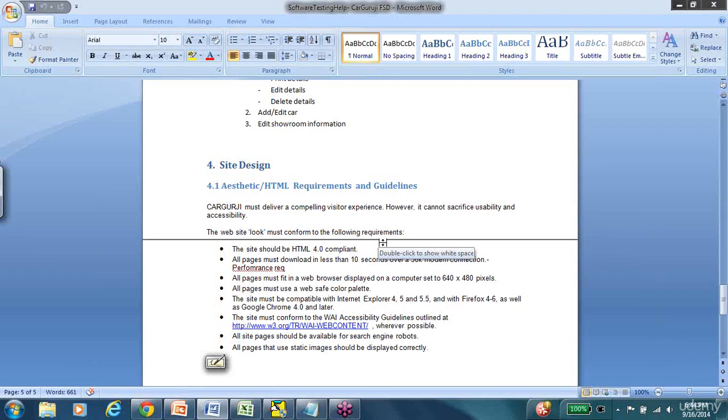The answer is no, because in most of the projects I worked on, when there were some performance-related requirements, the client used to first come to the QA team, the primary functional testing team, and ask, hey, there's just one performance-related requirement, would you be able to perform it? Most of the time they don't want to bring in an additional team for just one or two requirements. So in that case, it is always the job of the primary QA team, which is us, to at least make a list of things and tell them, hey, these need to be tested, even though we are not testing them directly.